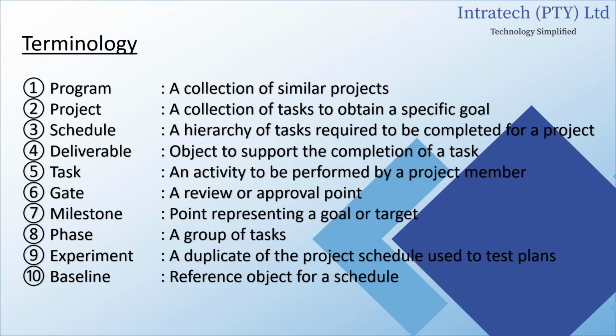Here is a general list of terminology for this demo. Please take note of the difference between program and project. The program is used to group similar projects together, sticking with our car chassis idea. Projects for the chassis of the Hyundai i20, i10, and i30 would all fall under the program of the Hyundai i-series cars. Each is a different project, but may share many similarities and so can be grouped together under a single program. Schedules are a hierarchy of tasks to be completed for a project.